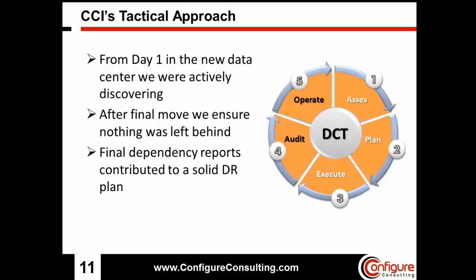So just to recap on our process there, our approach for Configure is we begin with the discovery and assessment period. We take that discovered data and we map it to applications and we view the dependencies. Based on those dependencies, we carve out the move groups and the move events. We execute the migration, starting with the earliest move first. Quite often it's the lowest risk.